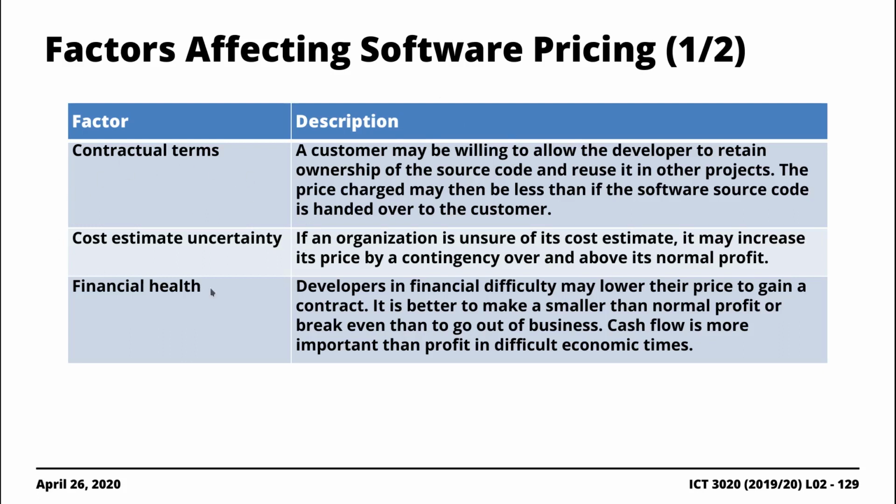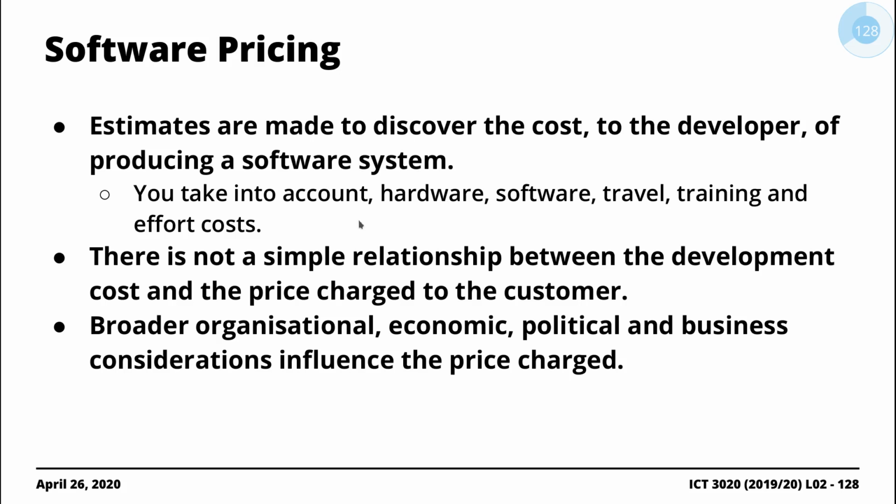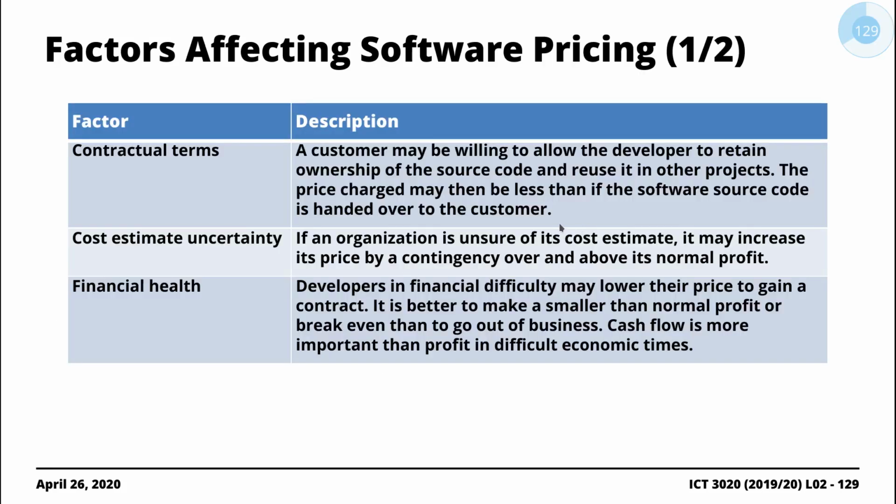You also need to take into account uncertainties associated with the cost, right? So think of what's currently happening right now in Zambia, this issue with the currency exchange rate. If some of these things that you're spending money on require that you make payments in currencies other than the one you commonly use, then it goes without saying that you potentially need to overprice, or come up with an overpriced value for this software price or software cost.